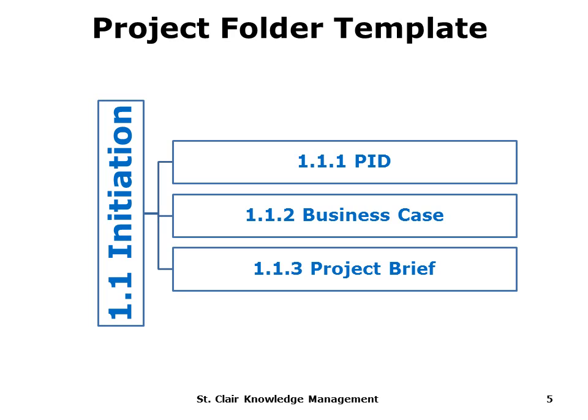So you start off by producing a business case, which is 1.1.3. Then moving on to the project brief, which is 1.1.3, excuse me. Then moving on to the business case, which is 1.1.2, which is where you get the funding. And then you move on to the PID, the project initiation document. Those are the three main categories in initiation.